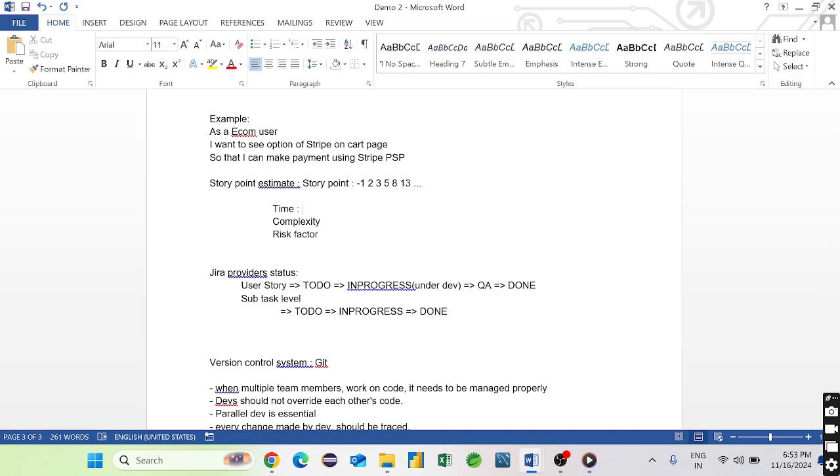First, the requirement gathered by the project owner should be given to the developer in an explanation format while creating the story. We want this button or stripe on the cart page, so how much time do you require to develop that using front end and Java? He says 2 days for front end and 2 days for the Java code, so 4 days are required from the developer.